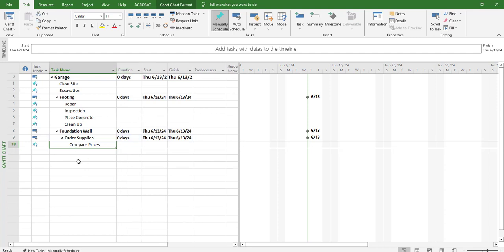Normally we have just a couple of tasks and subtasks, and sub-subtasks. In the project management world, we typically break down things in 2-week increments. However, I would suggest in construction, sometimes that is much too long. So really, we break that down in a way that allows us to get the job done.